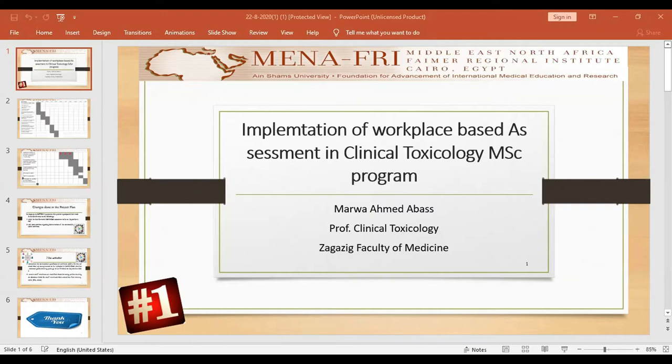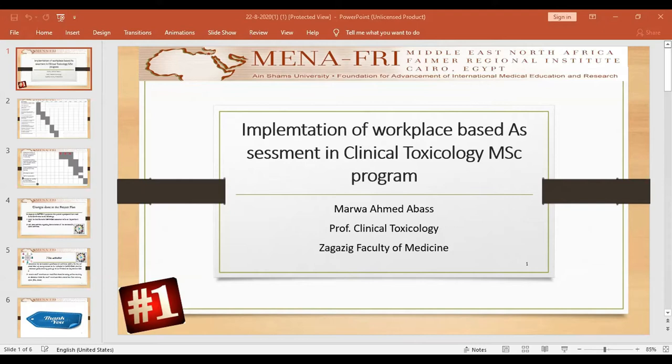For IRB approval and for maintenance and sustainability of my project, I incorporated my project as a part of the annual departmental improvement plan, and my department council approved it. Then I moved to the second phase.